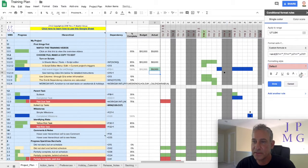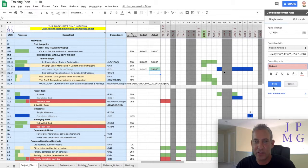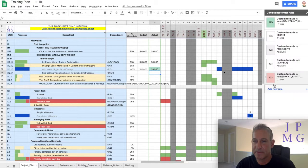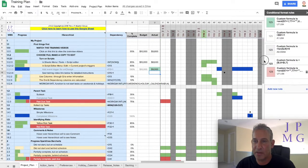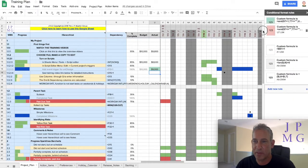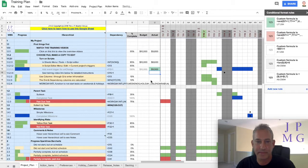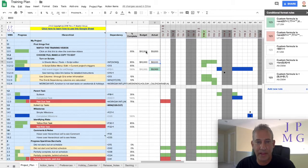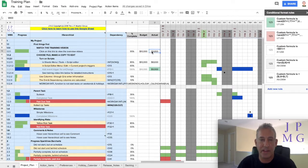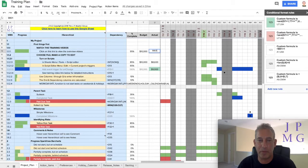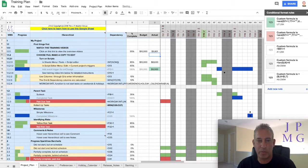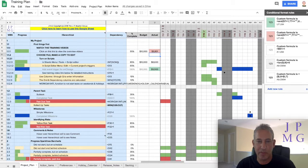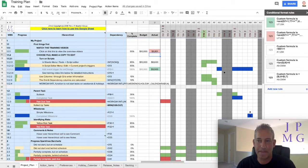If it's the case, I want to make it red. So basically, as long as I'm going over here, the percent complete plus 3%, make it red. And again, I'm going to drag this up underneath the green. And here, 98 plus 1 would probably cause it to go red at that point, more than 3%. See? Okay.